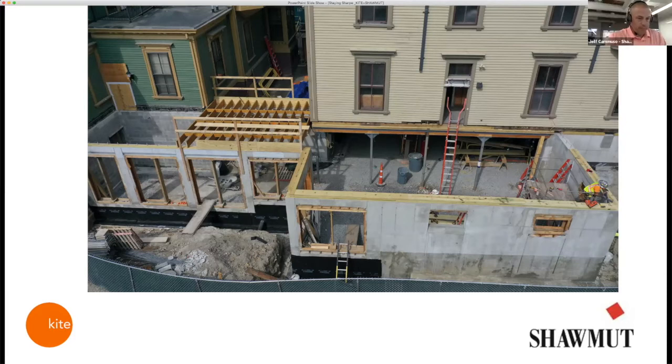Yeah, right. I will say that this is a design build project too. Again, KITE worked for Shawmut on this one, and that made us pay attention, because when the contractor wants something from you, it reverses the power dynamic of a traditional bid build and makes it something a lot more cooperative, frankly. And I think it challenged the contractors too, to not just dump something in the architect's or engineer's lap. We do have to work together, because we can't go back to our mutual client, the university, and say we can't do it. They're paying us to figure it out.